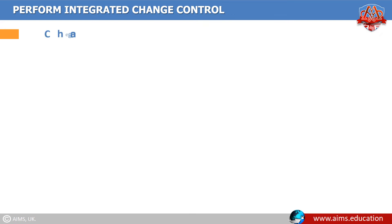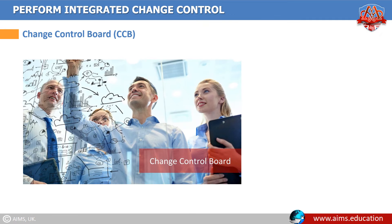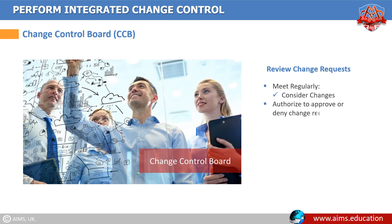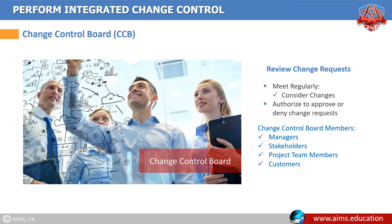Change control board: a change control board or change review board is established to review all change requests. The board members meet regularly to consider changes to the project and authorize, approve, or deny change requests. Change control board members may include managers, stakeholders, project team members, customers, and relevant experts.